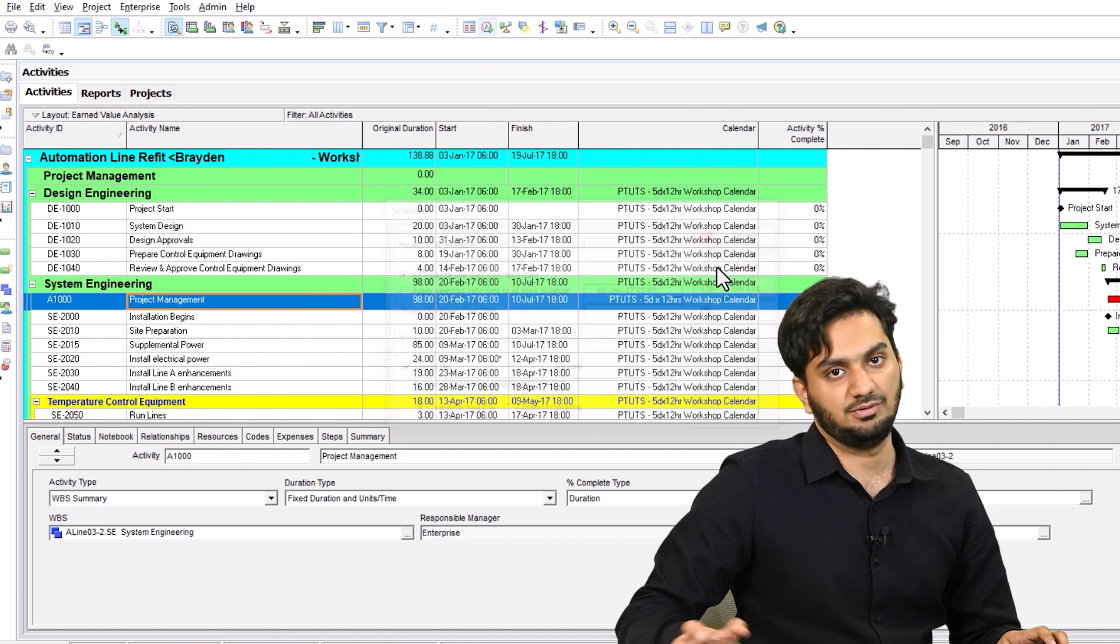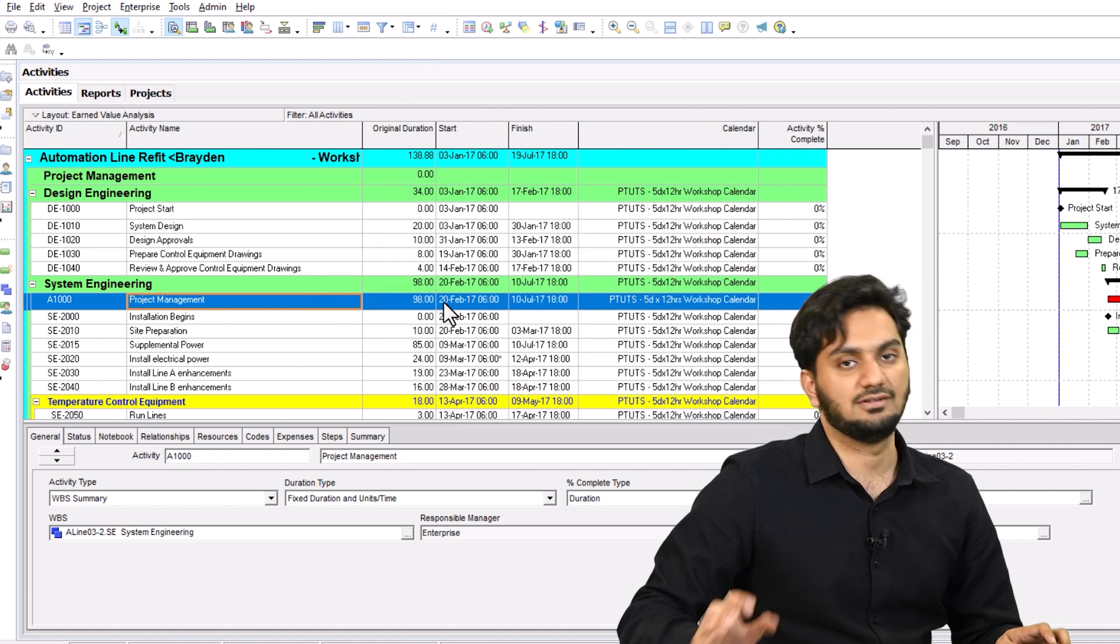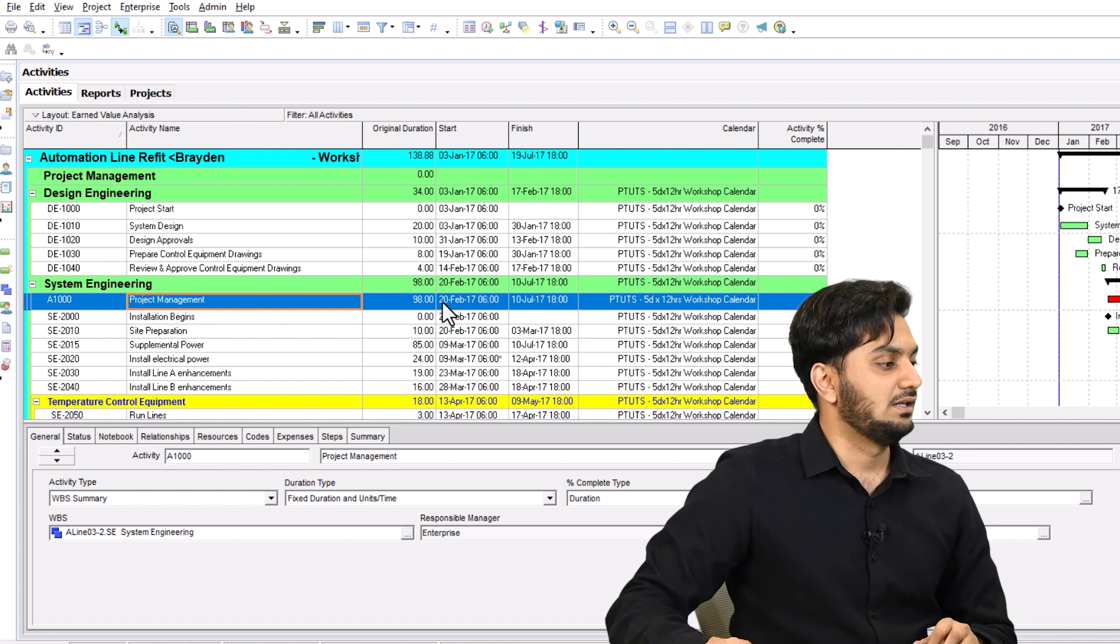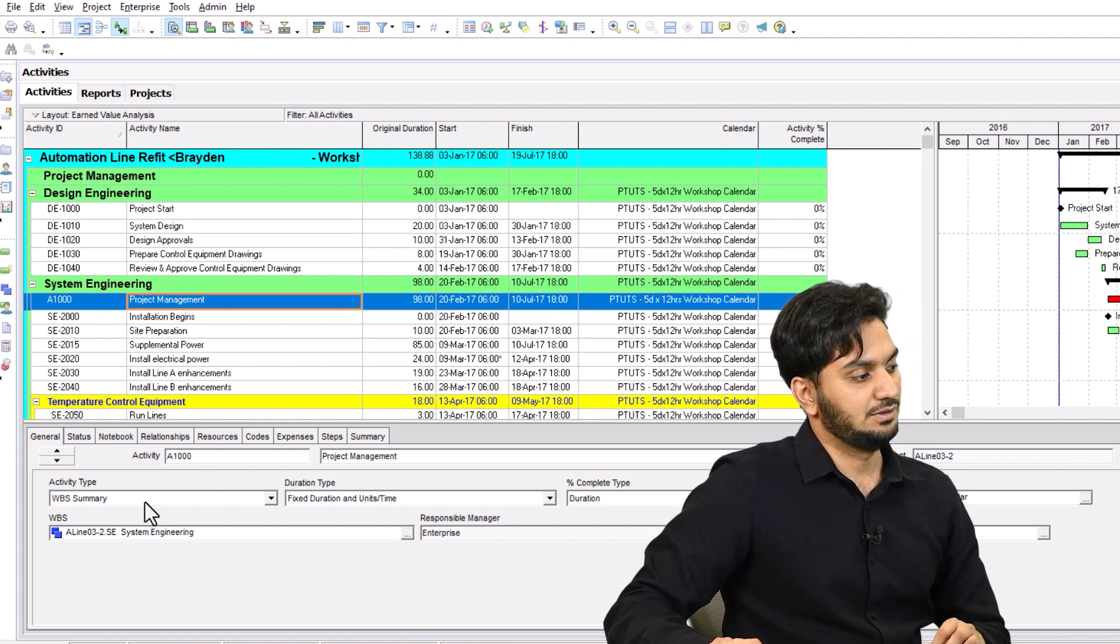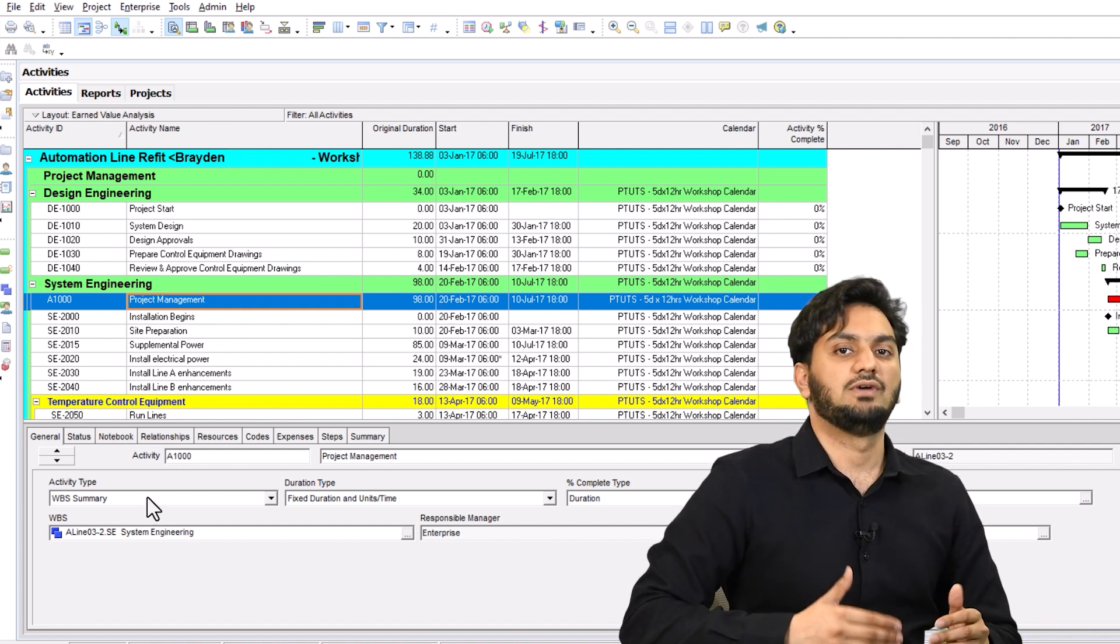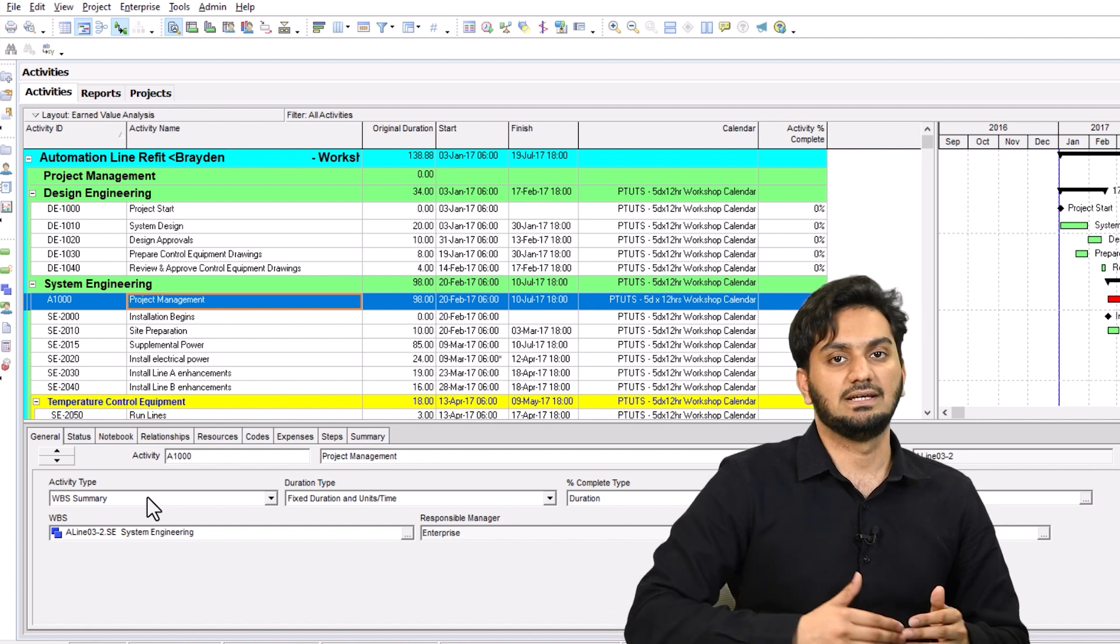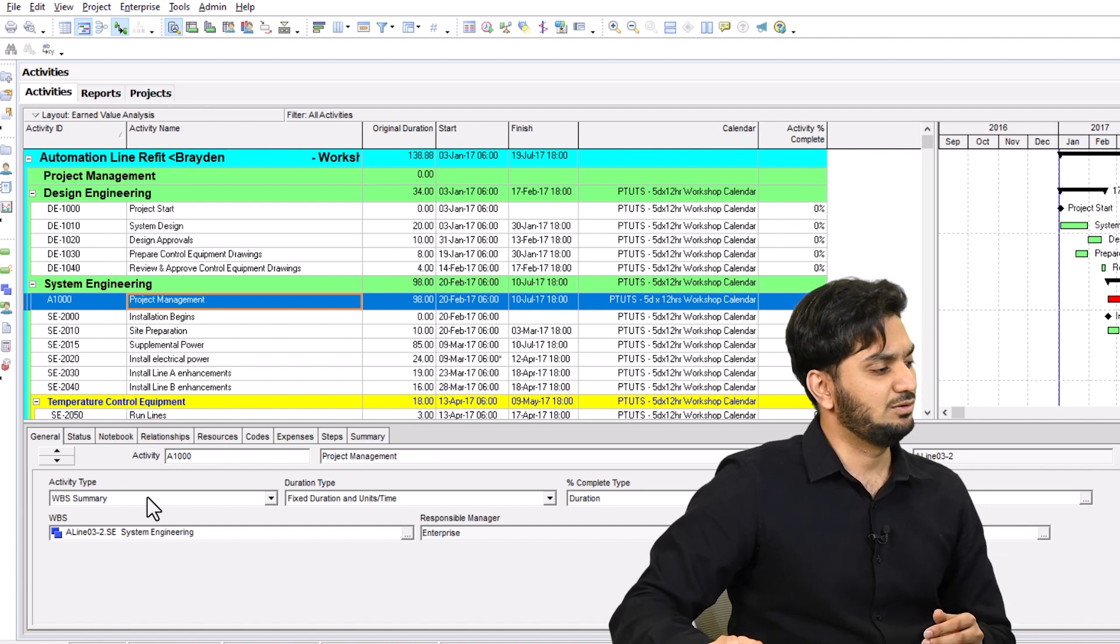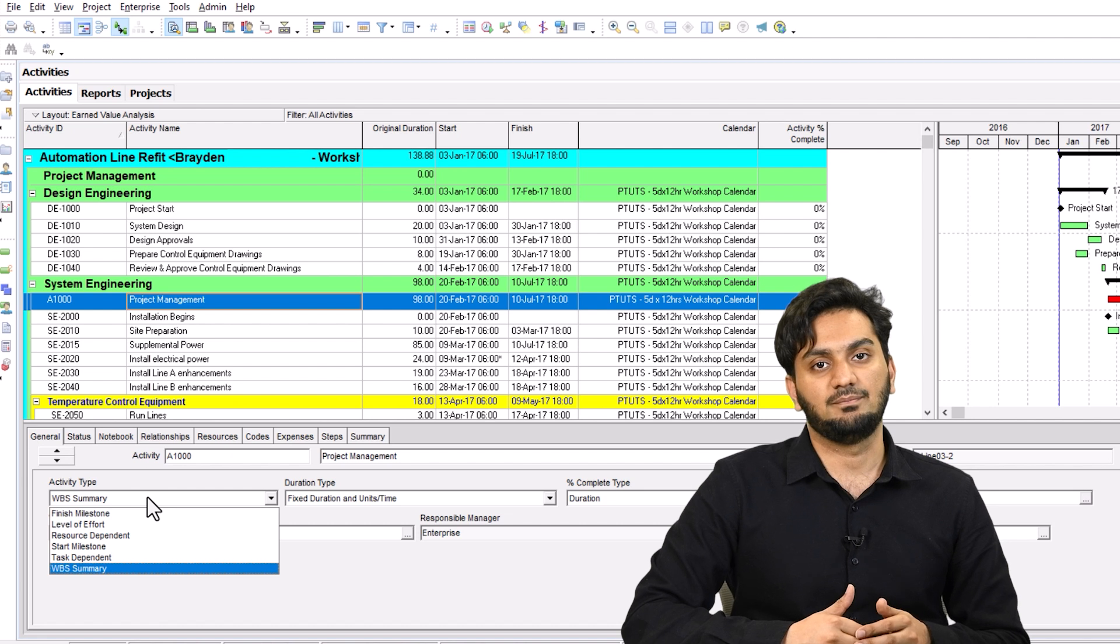Make sure to reschedule it, and then it takes the duration of that particular WBS. We have different work breakdown structures. Wherever you put this activity, it will take the duration of it. And it totally depends on your activity type.